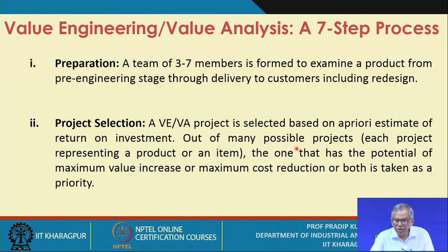And out of many possible projects, each project representing a product or an item, the one that has the potential of maximum value increase or maximum cost reduction or both is taken as a priority. So this is your goal, and this way we define the return or the benefits out of this value engineering or value analysis study.